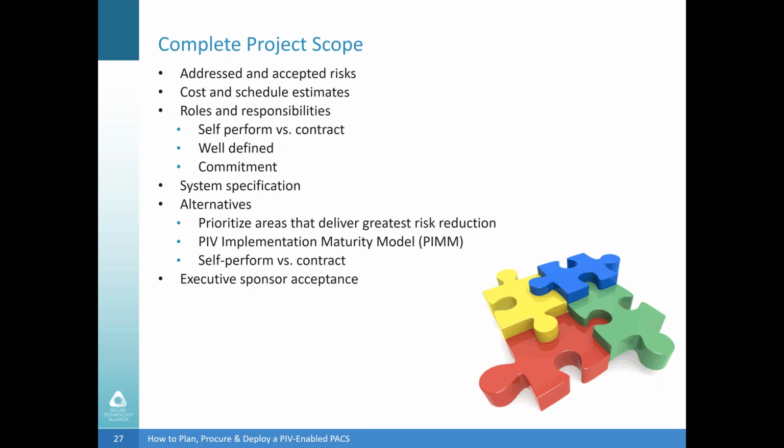Your system specification can take a bunch of different forms. In some cases, you'll need to require specific products to maintain compatibility with legacy pieces that you're planning on reusing. That may limit your options for the integrators. This approach also means you'll have already determined that the product meets your needs. If it doesn't, it's your responsibility.